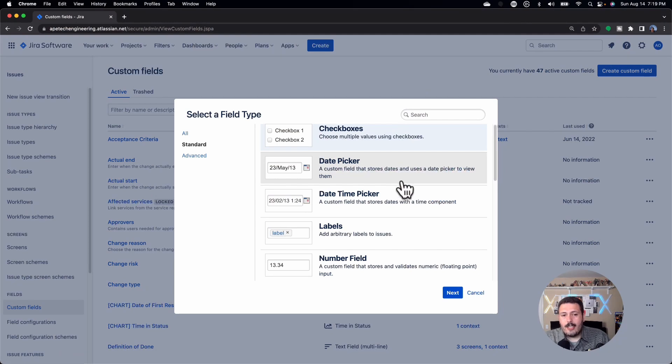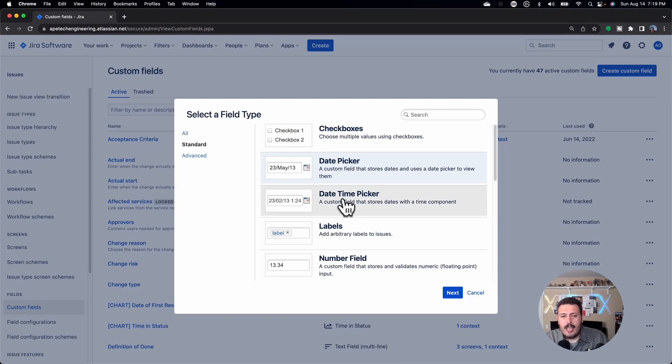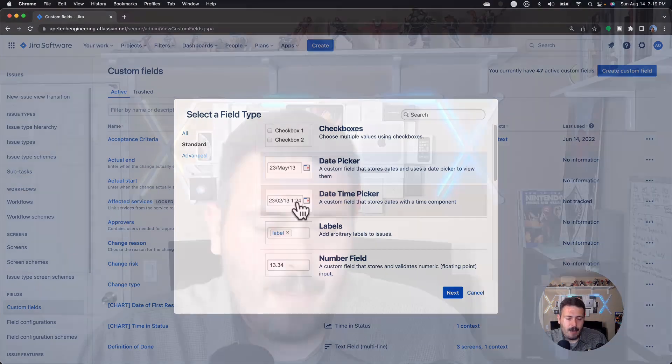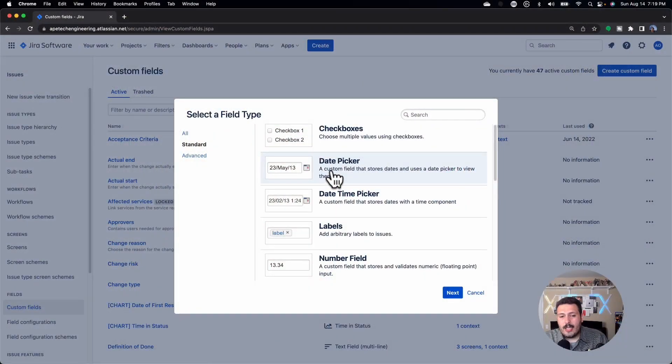The first one is a date picker. This one's pretty common — I like it. It's great if you're trying to put in additional dates. Out of the box, you get a start date and a due date in JIRA. But if you want to add intermediate dates — like a go live date or a code complete date — this is the one you want. You also have the option of a date-time picker, which also includes the time. I tend to find that to be a little bit of overkill, but it's up to you. I typically go with the date picker.